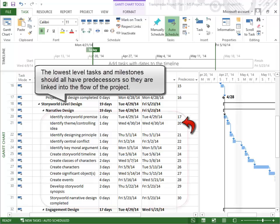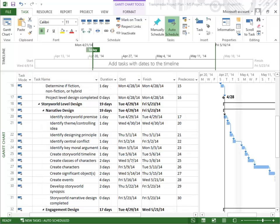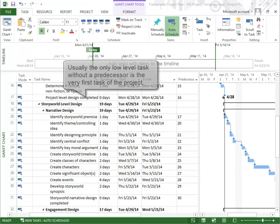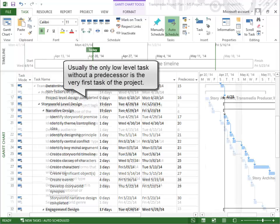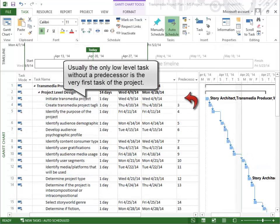This ensures they are linked into the flow of the project. Usually, the only low-level task without a predecessor is the very first task of the project.